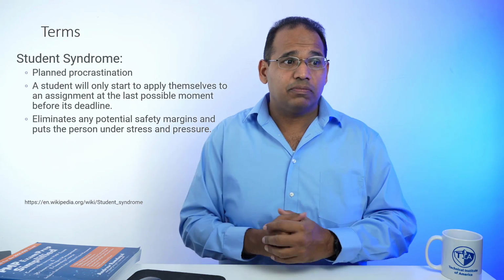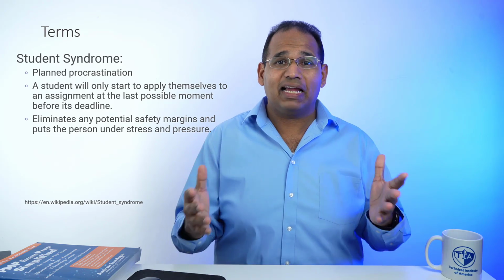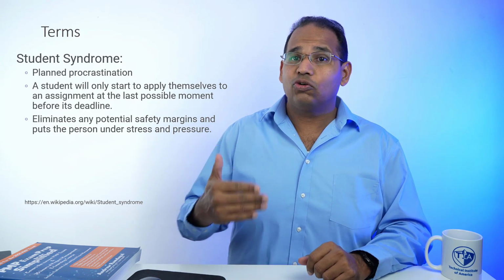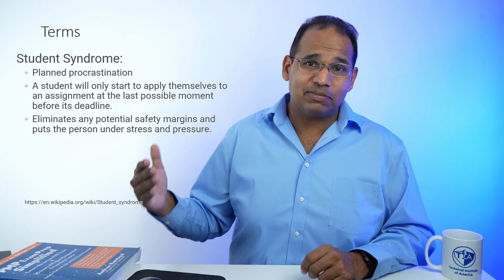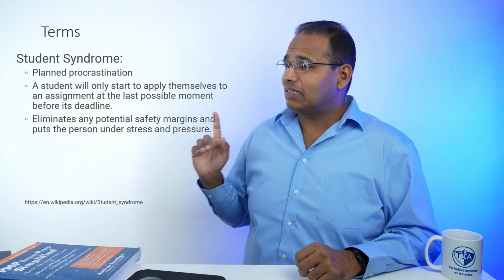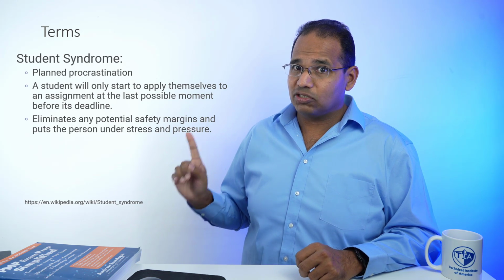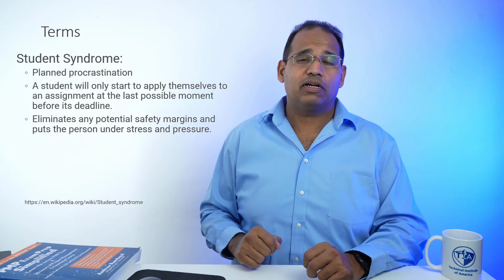Student syndrome is really known as planned procrastination. A student will only start to apply themselves at the last possible moment. What this does is that it removes any safety margin and puts them under more stress and pressure.